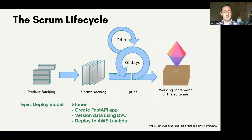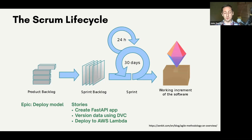What is Scrum? It's just a lifecycle, step by step. You have your product backlog — basically your epics. An epic could be 'deploy my machine learning model,' broken down into a bunch of stories that form your sprint backlog. Let's say we select: create an API, version our data with DVC, and deploy to AWS Lambda. That's what my team will try to achieve in the next two-week sprint. Once selected, we go into the sprint process — quick daily check-ins while letting the team self-organize and broadly focus on getting the job done. At the end, we have a working increment.